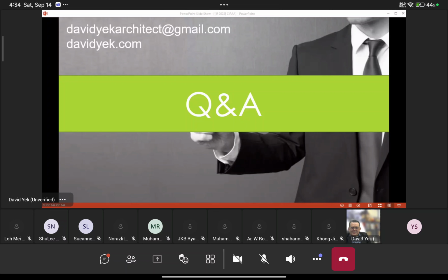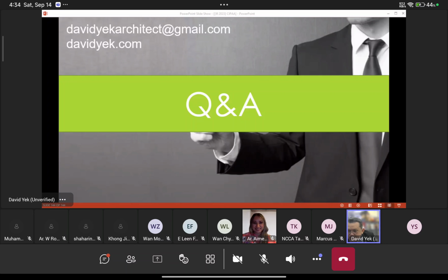There's a question from Mike. David, can you see the question? Is SIPA applicable to subcontracts? At this moment, yes, it is applicable to subcontracts, as long as it falls under the nature that is commercial.